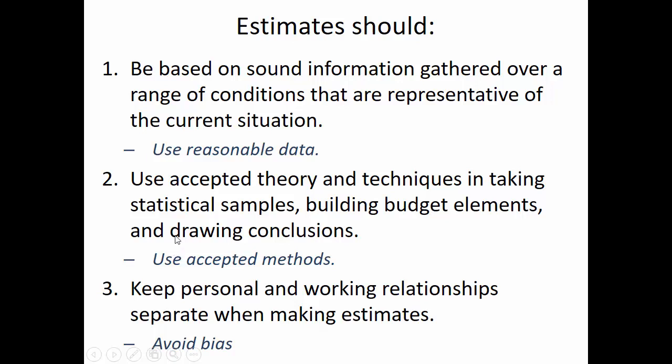When I was in engineering practice, a lot of people would make their own spreadsheets to solve structural calculations or hydraulic calculations. Spreadsheets are a really useful tool, but there are more standardized tools out there that are accepted and validated. When you build your own thing and other people haven't checked it, you may get mistakes out of that theory or technique. So that's what rule number 2 is: use accepted methods when you're analyzing data and projecting costs.